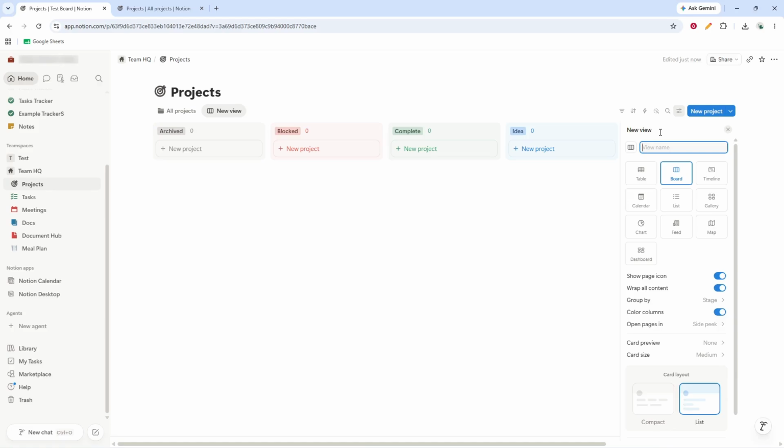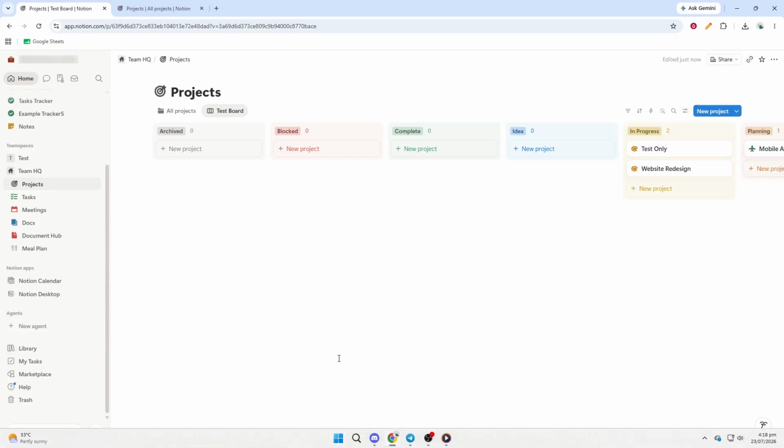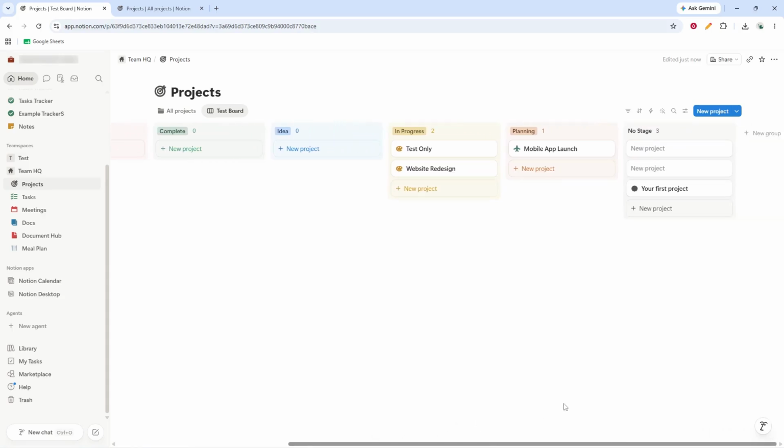you want to track. With the columns in place, begin adding task cards. Under any column, click New to create a card. Each card represents a single task or item of work. Add the task name first so the board is readable at a glance. Then continue creating as many cards as you need across the different columns, depending on where each task currently stands.